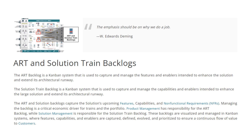There are four or five key points to understand. The backlog is a Kanban system. It is a backlog for the Agile Release Train. It captures features, capabilities, NFRs, and enablers.